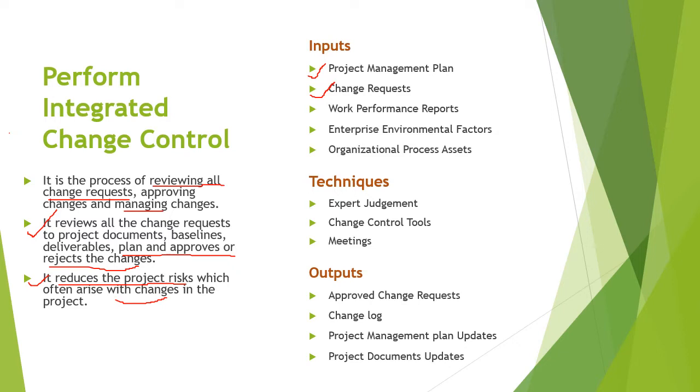Work performance reports. The work performance reports, which are of interest to the perform integrated change control process, can be resource availability, schedule and cost data, and earned value management reports. So EVM, the earned value management, we are going to discuss during our cost management videos, right?